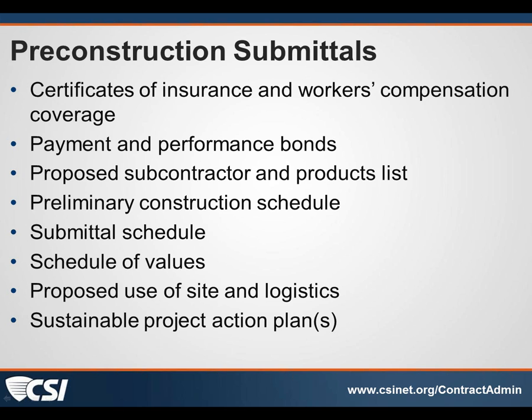Certainly, for example, certificates of insurance, being sure that the required policies are in place, and these get reviewed by the architect, engineer, the designer of record, and also by the owner because they affect their property. So workman's compensation coverage at appropriate levels, and these are things that need to be looked at pre-construction. Many times they are things that carry renewal dates that need to be looked at during the life of the project.